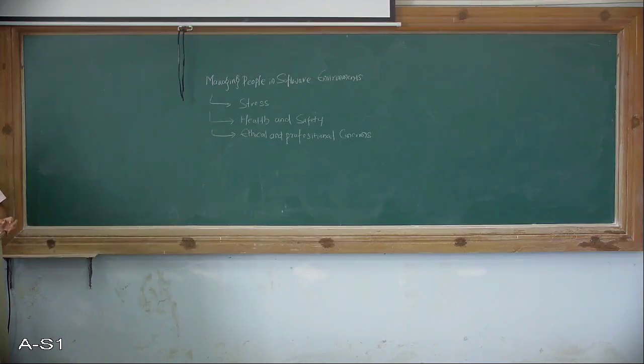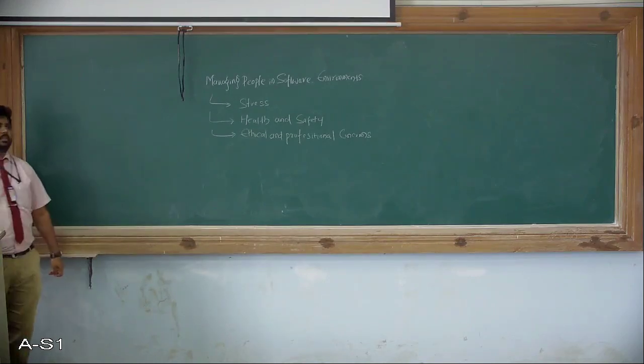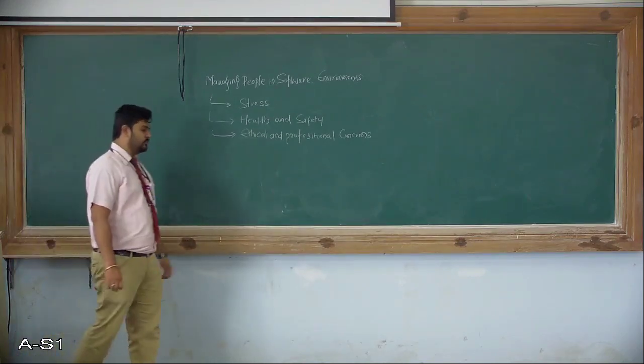Then another thing which may cause stress in the project duration is that a good project manager can reduce the reliance over time by more realistic assessment of effort and elapsed time needed, based on the careful recording and analysis of the performance of previous projects. Okay, the project manager is held responsible for this.